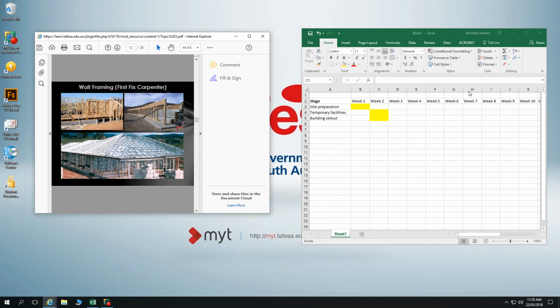So that has implications on our bar chart that we're setting out there. So we'll do our concrete pour. I won't go through it because we have to keep moving on. But put in there our concrete pour, and then we're going to have a gap. Now, we might fill that gap in with something, or it might be another project that we work on. That is up to the person scheduling.